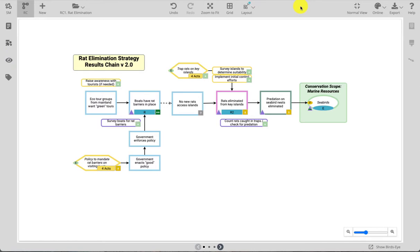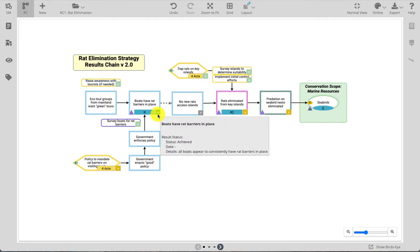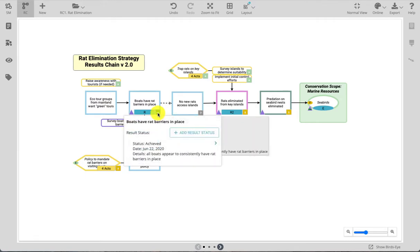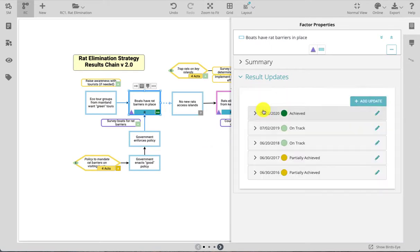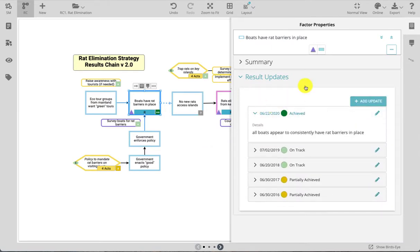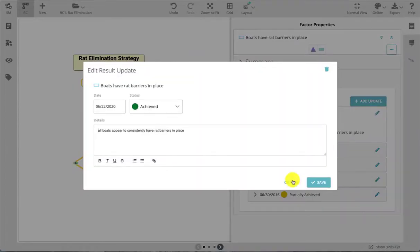To quickly view status details for either results or strategies and activities, hover over the status light in the lower right. Clicking once on the status light will give you access to provide a new result update or navigate to the details that have already been recorded. In the factor properties panel for each result you will see the list of all recorded result updates, and if you have editor access you can edit existing updates or you can add new updates.